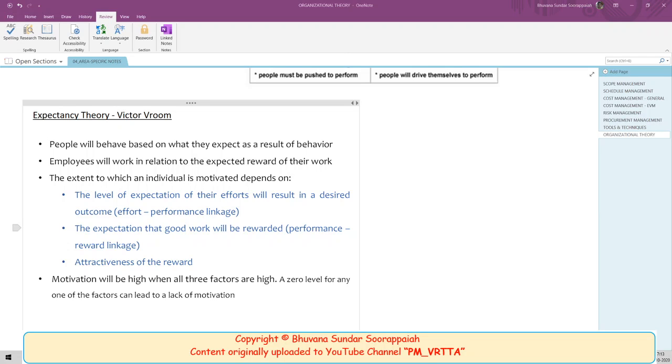Imagine a person has got a baby, a guy actually has got a baby, and he has to go home early to support his wife, or sometimes work from home and everything. The best reward you can give him is not giving him an Amazon voucher. In fact, they may not want a promotion. At that time, giving more responsibility will actually be demotivating. Promotions can be demotivating. You make sure that person gets less responsibility with no cut in salary, but everyone is sharing his responsibility so he can concentrate on his personal life. I'm giving a man as a responsible example, not a woman as an example here, for a valid reason.